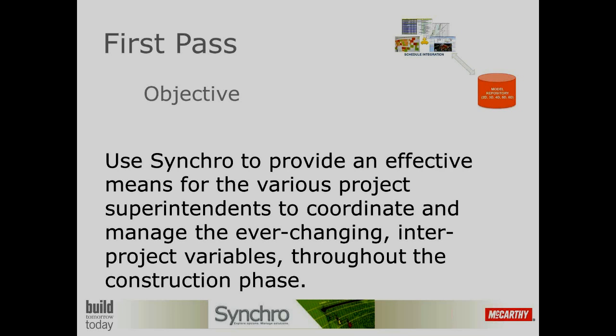Really, our objective during the course of construction was to provide an effective means for the superintendents across 5 different projects to understand and communicate and collaborate together, to understand what each project is doing, when it's doing it, and how their schedule is impacting each of the other respective projects. Up to this point, it was digging through a gazillion activity IDs in the various projects and trying to anticipate what was happening, but not really knowing what the impacts from all the different changes were.